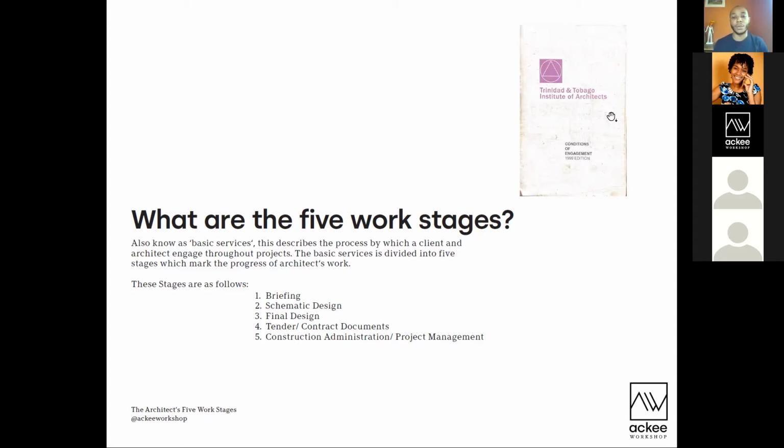All right. According to the TTIA, they have set a standard of 5 stages, right? I have the scan of the booklet on the top right. The TTIA stands for the Trinidad and Tobago Institute of Architects, right? According to their conditions of engagement, which was done in 1999, they have broken down the basic services into 5 work stages, okay? And those stages are the briefing stage, the schematic design stage, tender/contract documents, and construction administration/project management.